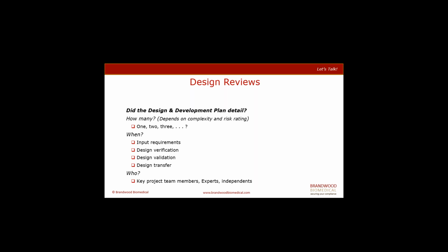From there, we start going into design reviews. So design reviews are a snapshot during the project lifecycle to capture that the project is developing as intended. So the amount of design reviews that will be required really will depend on the complexity and the risk of the particular device being developed. It could be 1, 2, 3, possibly many design reviews that are taken over the period of the project.